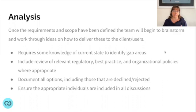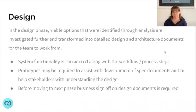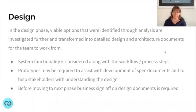You want to keep your design process closely aligned with your analysis. If key stakeholders are left out of the analysis phase, you risk people emerging in the design component saying things were forgotten — which doesn't work well with the waterfall model. In the design phase, you take the viable options from analysis and investigate them further, creating detailed design and architecture documents to work from during the build phase. System functionality, workflow, and process steps must be included. This phase typically results in process mapping documents and build specifications, which must be signed off before moving forward, as they'll be referenced throughout testing.